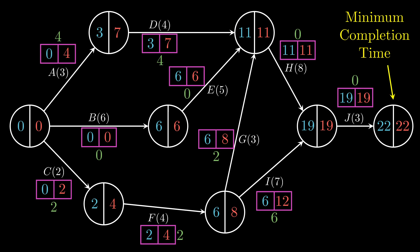Now you might notice that there is this path from the starting point to the finishing point, where all the float times here are 0, which means these are activities where you cannot afford to wait. And that sort of only makes sense, right, there can't be any point in time where everybody's sitting around waiting, so someone's probably got an urgent task to do in order to finish as quickly as possible.